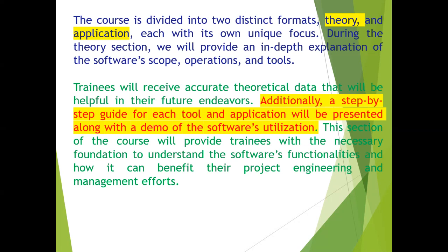Each activity is fully resource and cost loaded. Each activity is properly connected to one another. Each activity has a proper relationship. Each activity, if any constraint, any assumption, how we do that. Then once the plan is submitted and approved, you need to track it. How do you track that? How do you compare the plan versus actual?